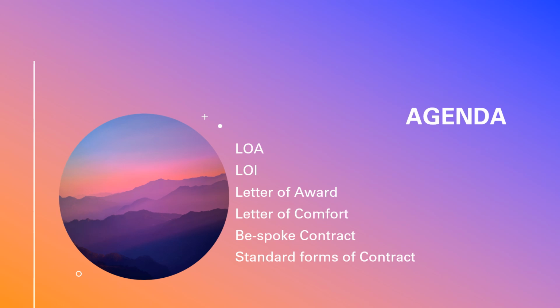You don't need to go through one by one because it's already time tested. It's already known to all the parties. It's known to the contractor, the employer, and the consultant. And secondly, there will be a balanced allocation of risk, responsibility, and obligation. Mainly when you use a FIDIC form of contract, the contractor knows completely about the form of contract. He knows the general conditions, so he will not load his risk on it.